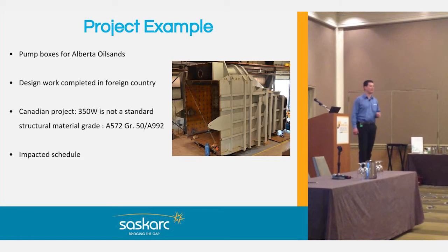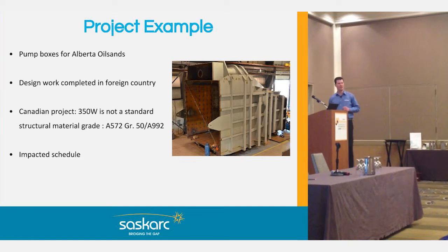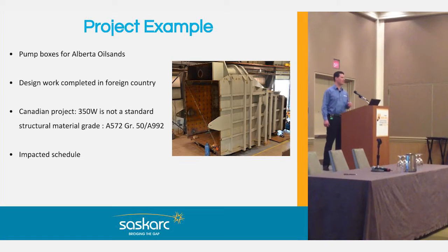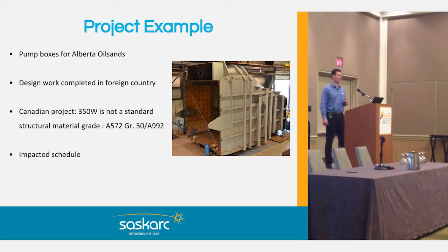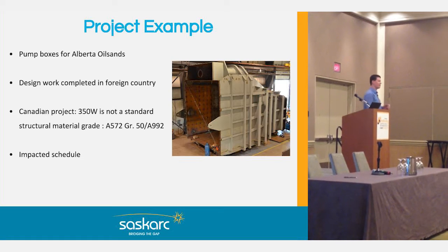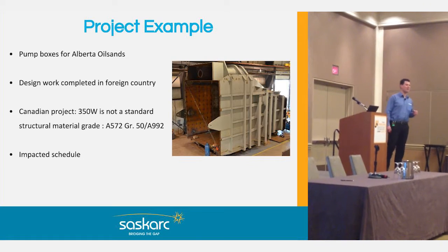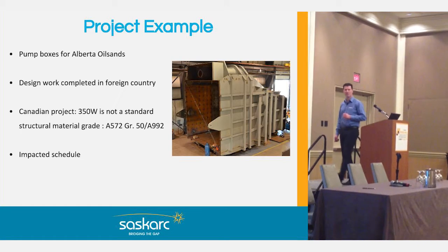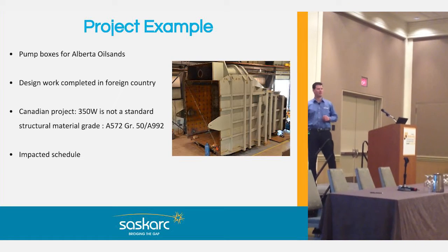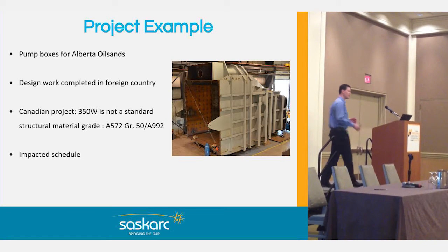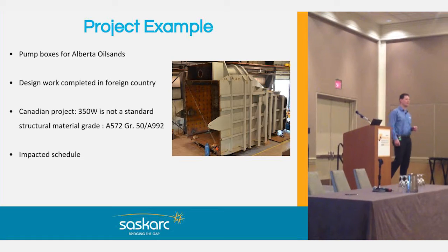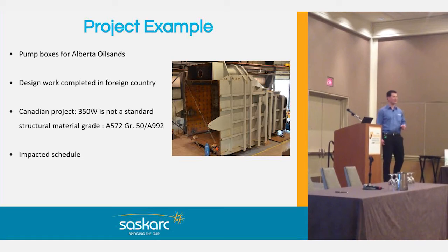And the reason I wanted to showcase this project is by us becoming involved as the fabricator, we were able to compress the schedule by 12 weeks just by understanding and recognizing that and going back to our client, the EPC, and recommending to them that if we switch the material grade, there would be this schedule savings. And just wanted to showcase that to you to give an example of what can come about through project collaboration.